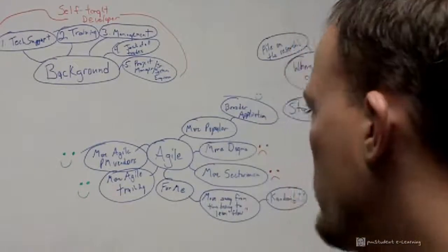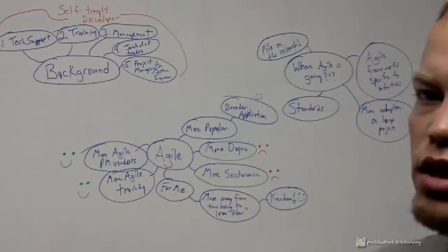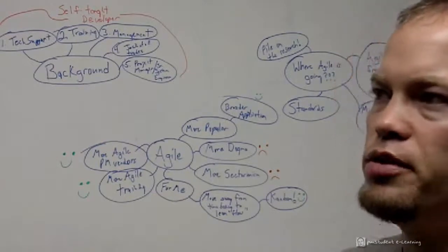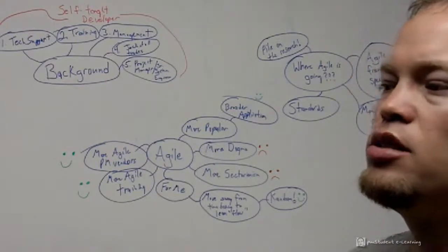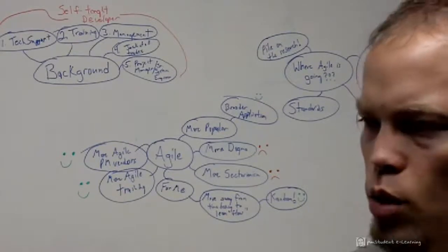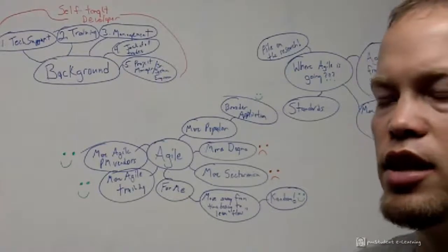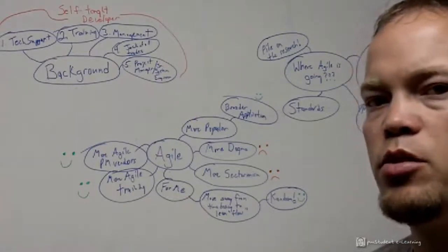But for me personally, I've moved away from time boxing to more of a lean flow and more of a manage the work in process and try to reduce the work in process, get people focused on one thing at a time, get that thing done before you move on to the next thing. A pull system, essentially, with my projects.